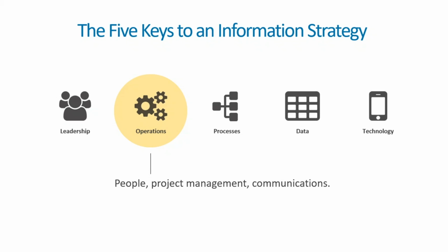And it's not just about finance, although having that necessary budget is important. A lot of organizations don't consider the true cost of implementing technology from an available resource capacity standpoint. And so even if they develop a budget for getting the technology implemented or even getting it adopted initially, the resources aren't available in the operations of the organization to help secure the adoption of that technology over a prolonged period of time, which is what you want.